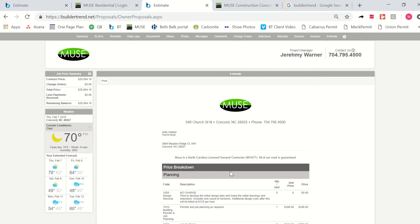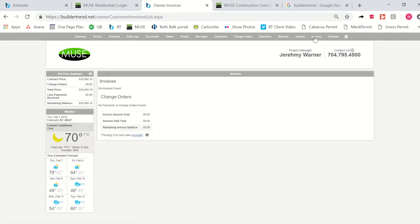After you've approved your estimate, that is our cue to start ordering your products, but we need to get your deposit first. So you're going to see a tab up here called invoices. And on this tab, you're going to be able to see an invoice for an initial deposit.